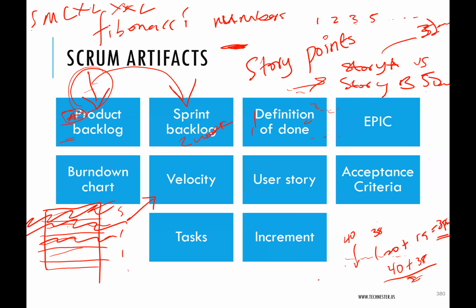So you assign t-shirt sizes to the stories in the product backlog. The developers may look at one story and say, okay, this one is small, meaning it's something that will take them a certain amount of time. So they will have the meaning of small for that organization or for that team. So small may mean 2 days or 1 day or 5 hours. Medium may mean a whole day. Large may mean 2 days, right? So they will have what that means to them. So they assign these different values to stories in order to know which is more complex than another.